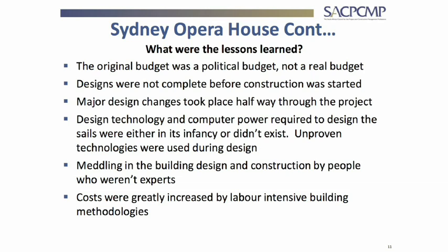And it's not even always technology and computers. We can have simple things like resources in the country. If we look at welders in South Africa these days, how many skilled welders do you get these days? With various major and mega projects running in the country, there's only a handful, which means there won't even be enough to service all of those markets.